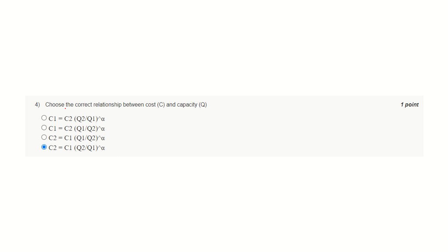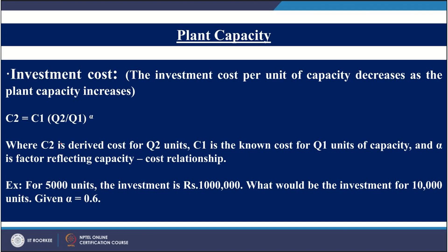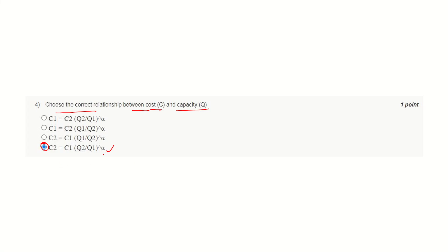Question number four. Choose the correct relation between cost and capacity. The correct answer is C equals this expression. Here you may note the expression where C2 stands for derived cost for Q2 units and C1 is the known cost for Q1 units of capacity, and alpha is a factor reflecting the capacity-cost relationship. So this is the correct answer.